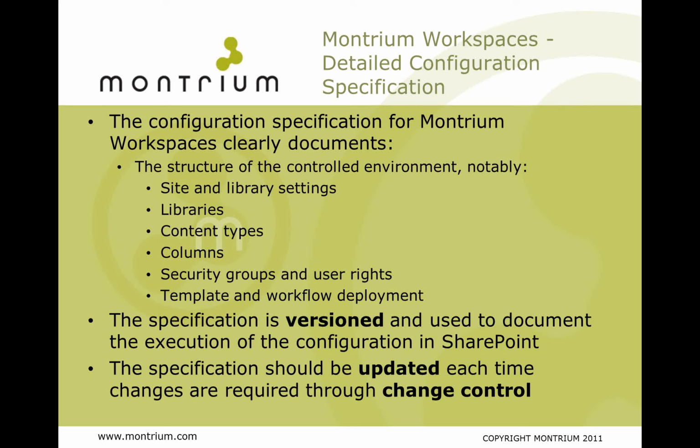And so this is a very, very important document because it really gives us all of the information that we need to then sit down and actually configure our qualified SharePoint environment. The document is versioned and is also used to document the execution and QC of that environment once it's actually been configured. Every time we want to make a change to our configuration, we should really update the configuration specification as well, and that's usually done through change control.